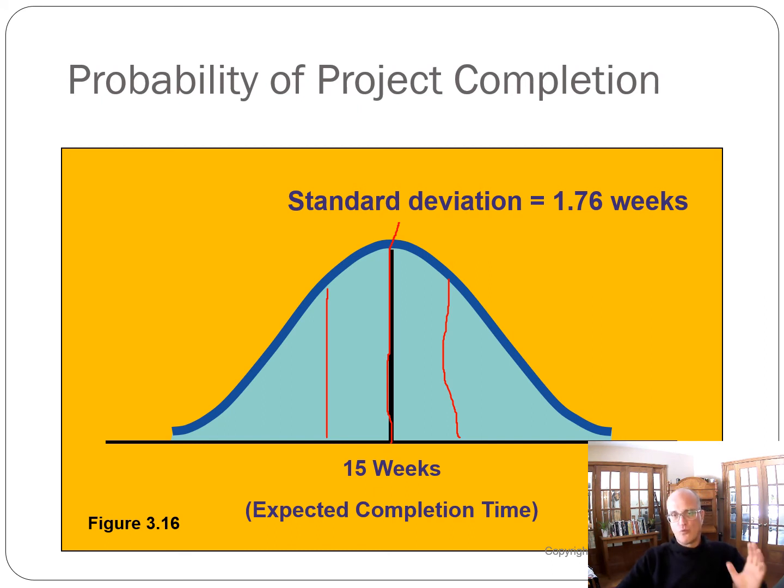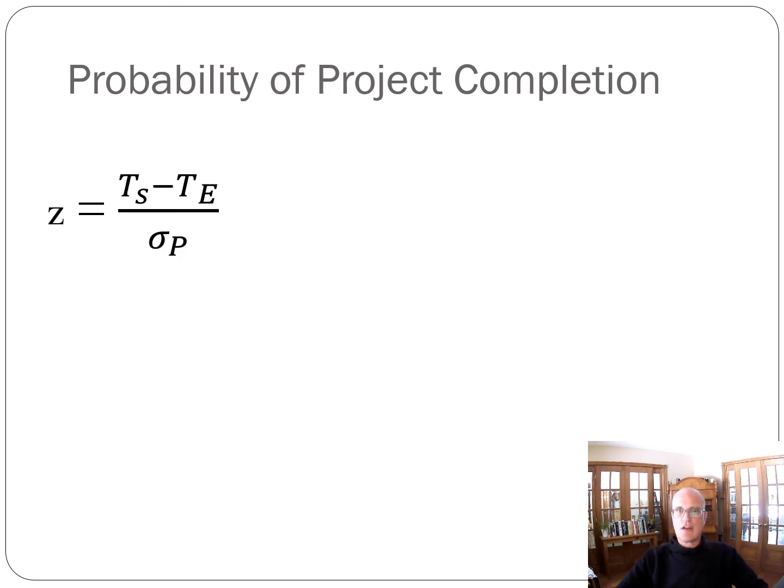So we look at the normal distribution, and then we can take a Z value, which is TS is the target time, TE is the expected time, divided by the standard deviation. This is another place that students often go wrong. They won't do the standard deviation, they will do the variance, and then they'll get a value that causes them some grief. And when you have that Z value, you can go to a standard normal table and find your probability.